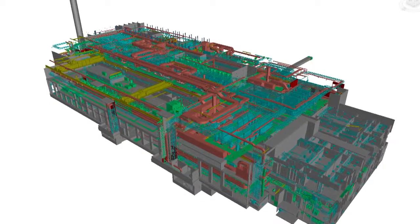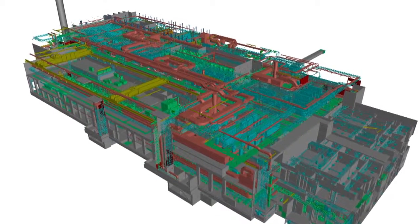We physically embed safety case authors and those conventional safety experts within our delivery team, so that the safety case issues that can be engineered are engineered out at source, and if they can't be engineered out, that dialogue happens directly with the authors. And a method we use to develop resolution of those is associated with space management. Space management of a multi-floored process building is vital. We try and develop that early within the design.